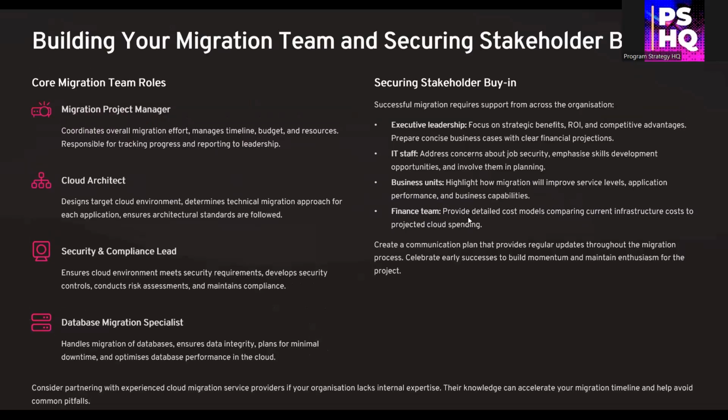A successful cloud migration is not just a technical effort, it's an organizational initiative. That's why building the right team and securing stakeholder buy in is critical. Here are your core team roles: migration project manager, central coordinator responsible for timelines, budgets, and reporting progress.